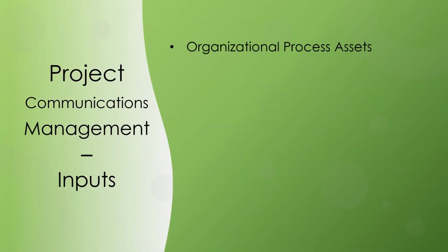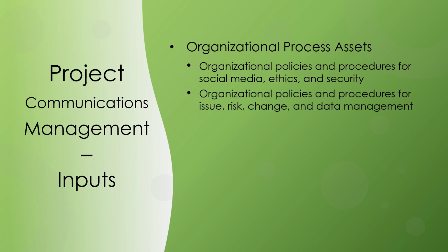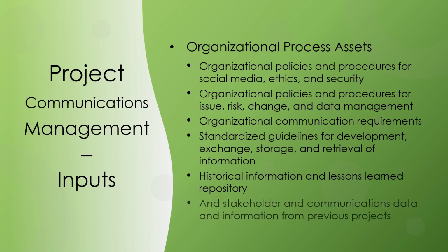The organizational process assets that can influence the plan communications management process include organizational policies and procedures for social media, ethics and security, organizational policies and procedures for issue, risk, change, and data management, organizational communication requirements, standardized guidelines for development, exchange, storage, and retrieval of information, historical information and lessons learned repository, and stakeholder and communications data and information from previous projects.